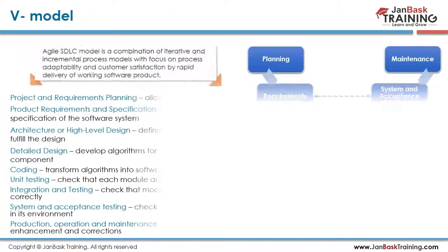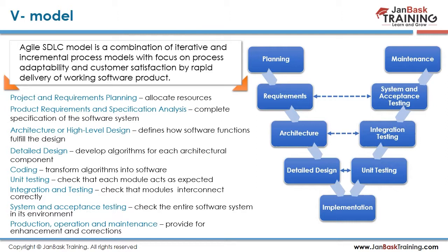Okay, so next comes the V model. The V model is something very specific, used when the requirement phases are very clear, and for each step we need to do the validation in parallel. In the V model, we do verification and validation. Both words start with V, verification and validation. That's why we call it the V model. On each step there is nothing different from any of the other models, but the only thing here is that in every step we need to do the validation as well. We can't move on to the next step without having a validation. So it's like a sequential cycle where we validate each phase and then complete it to move to the next phase.